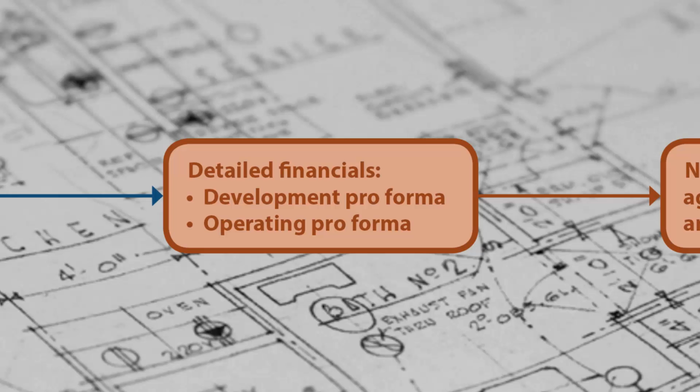We continue to revise and refine the project's pro forma. Our initial back-of-the-envelope numbers give way to estimates that are professionally informed and project-specific. Now, as deal-making progresses, we can fill in actual contracted amounts based on pre-leasing activity and firm bids for construction. The budget should still have contingencies built in, a pot of money just in case, because no project ever performs exactly as projected. But while the numbers aren't guaranteed to be perfect, the level of deviation that we expect gets smaller.